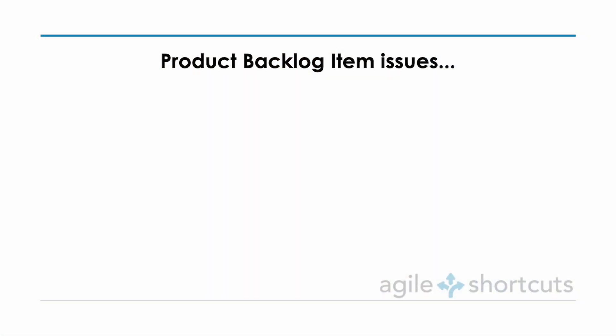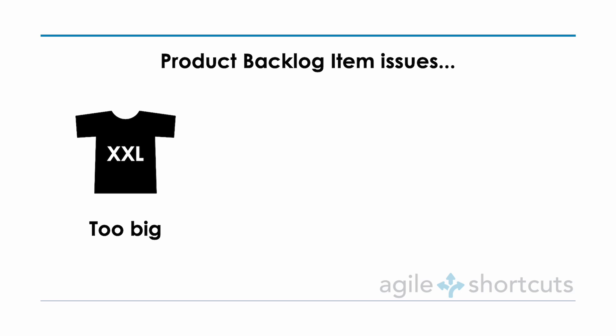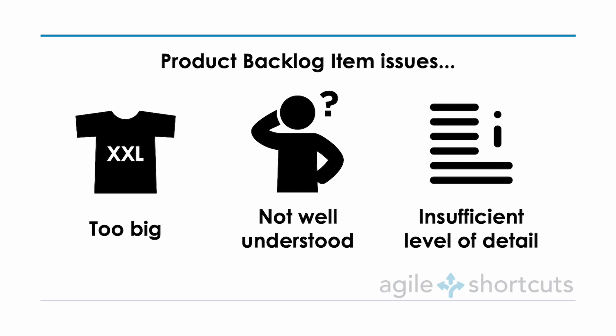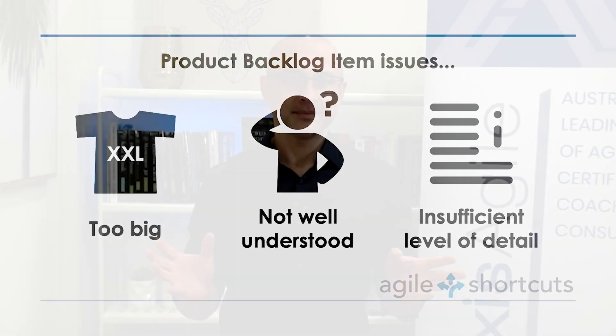In my first video I mentioned that one of the reasons teams don't complete their sprint plan is due to inadequate product backlog refinement. So in this video let's focus on that. Typically what happens is teams bring product backlog items into their sprint with one or a combination of the following three issues: firstly, those items are too big; secondly, they are not well understood; and thirdly, they may have an insufficient level of detail.